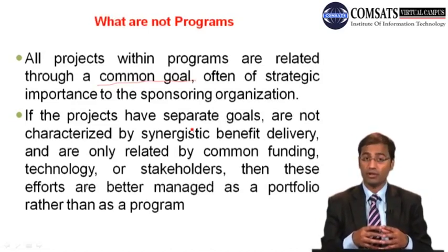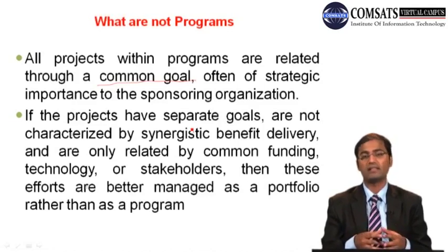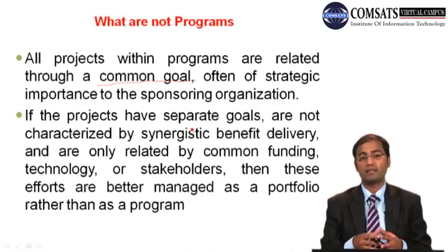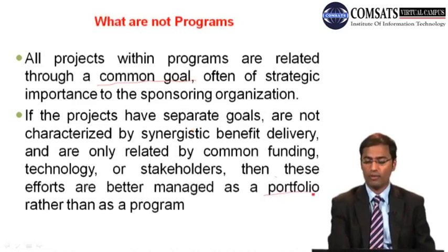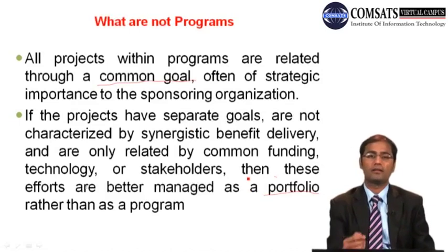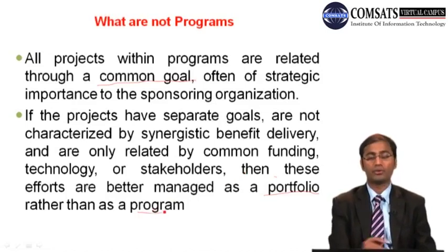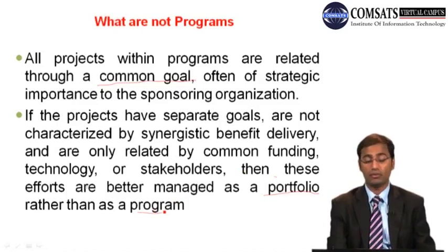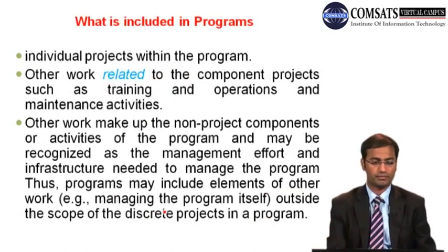If the projects have separate goals, are not characterized by synergistic benefit delivery, and are only related by common funding, technology or stakeholders, then these efforts are better managed as portfolio management rather than program management. We are going to talk about portfolios in a relevant section. We have very good resources available on that, but now we are only dealing with programs. So I hope we now have a good understanding of programs.